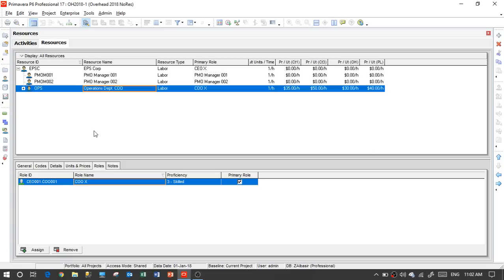Design team in particular, most of the time, they are not overloaded or they don't have enough work. They are not booked for projects. This team is a permanent team in the corporate, and we don't have a specific project to book on most of the time. And if they book in a project, they just give this project more cost, which doesn't give us the real estimate of how much this project is really costing us.